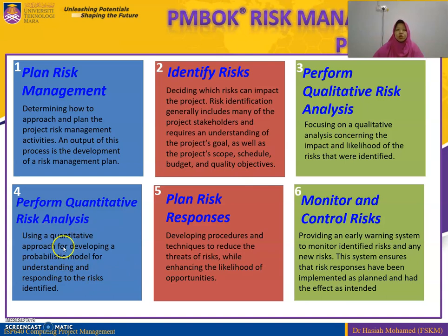Number 4, perform quantitative risk analysis. We use a quantitative approach to develop a probabilistic model, to understand and respond to the risks identified. Number 5, plan risk responses. We develop the procedures and techniques to reduce the threat of risk while enhancing the likelihood of the opportunities. And number 6, monitor and control risk. This is where we provide an early warning system to monitor identified risks and new risks.